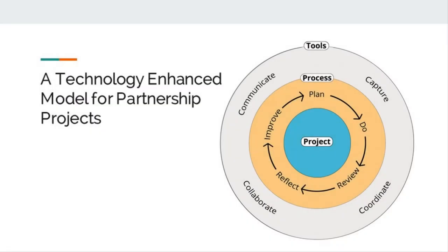We applied our agile team working principles to the student partnership project, resulting in a new approach we call micro sprints. Micro sprints are three hours long and are split into four stages.